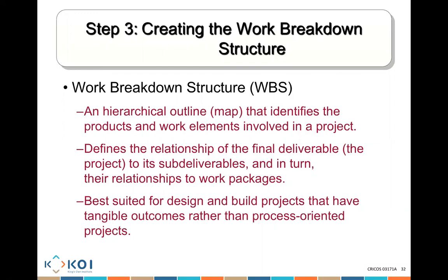So attend the class, that's 2 hours. You need to put a time and you need to put a resource. You put that person. Review the materials, that's you. You have to do it. You're going to put a time, you're going to put the person doing it. Summarizing it, again, you're going to put the time, you're going to put the person doing it. You do that every single week. And if you do it correctly, week 1, week 2, week 3, week 4, whatever it is, you'll be able to have the work breakdown structure completed for that sub-component, which is let's do well in the midterm exam.